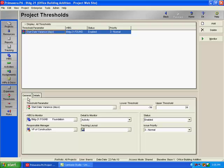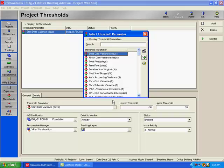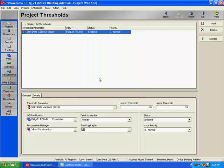On the tabs at the bottom, let's start on the General tab. The first thing that you need to decide is which parameter you're going to monitor. And if you click on the Browse button, you'll see a list of parameters that are displayed. I would strongly suggest that you access the Help information to see how these are calculated and for a definition of each one of these parameters. I started with Start Date Variance in Days.